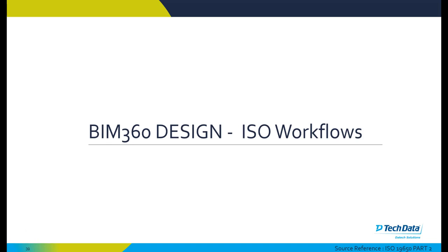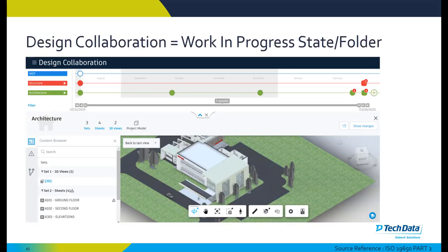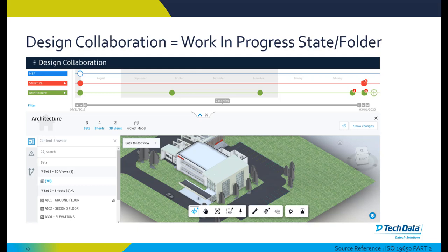Looking at some BIM 360 design workflows, our BIM 360 design or design collaboration module effectively acts as our work in progress folder within our ISO compliant workflows. The previous workflows we looked at only used BIM 360 document management, but with the add-on of design collaboration you can further enhance that with this swim lane view that we can see at the top of the screen. Each of these represents a different iteration of the model and a different sharing of the model, and this is all captured and recorded per team within our swim lane view in design collaboration.